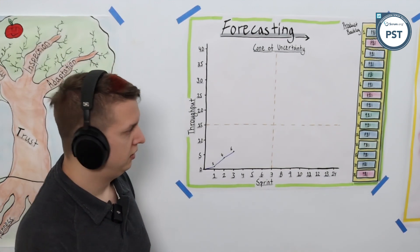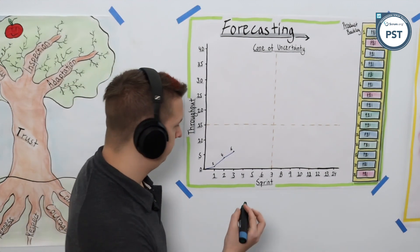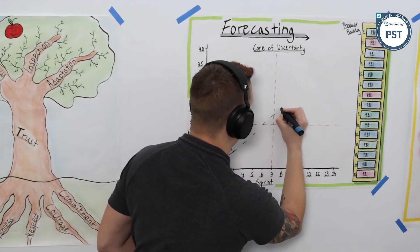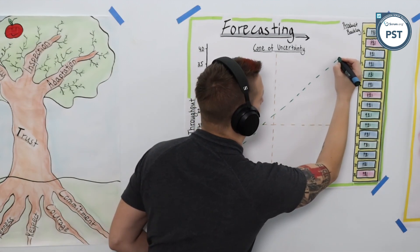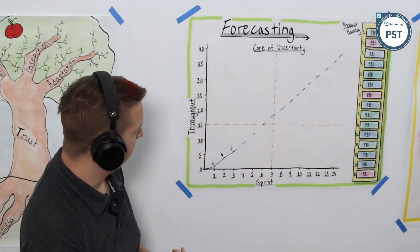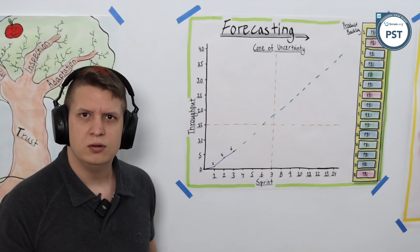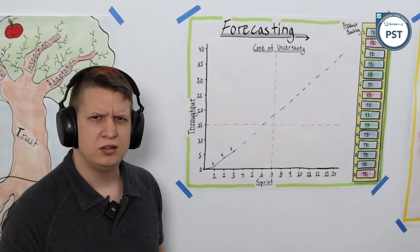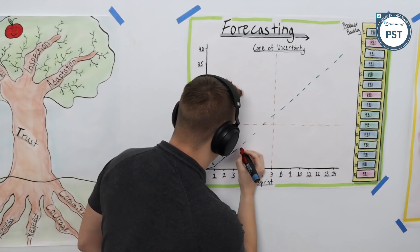Let's start with the best case - we like to be optimistic after all - and let's draw out that line into the future. Now of course we want to look at the worst case scenario as well, and let's draw that line out into the future.